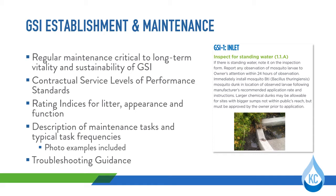The manual then provides a list of standard maintenance tasks to be performed based on the green stormwater infrastructure component types. Photo examples are included, often providing examples of what is considered good and bad. General guidelines regarding frequency of each task are also included. Because maintenance needs vary greatly by site and surrounding conditions, these frequencies are intended to be starting points. The contractor is required to adjust the maintenance frequencies as needed based on meeting the required service levels of performance standards. Lastly, a section is provided on troubleshooting recurring or larger maintenance issues that go above and beyond standard preventative maintenance tasks, drawing on lessons learned from past projects.